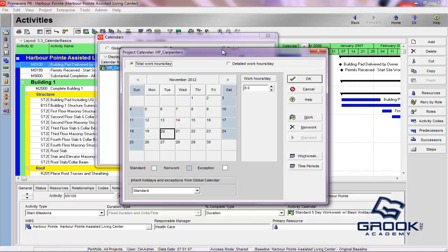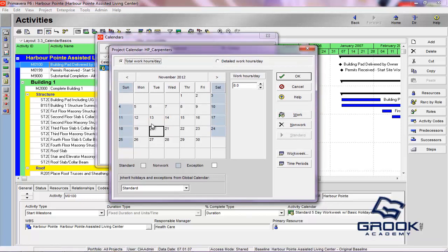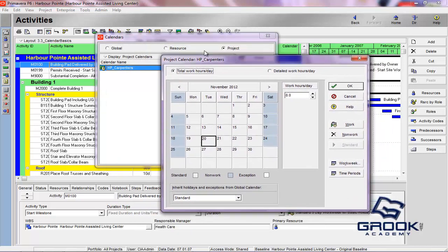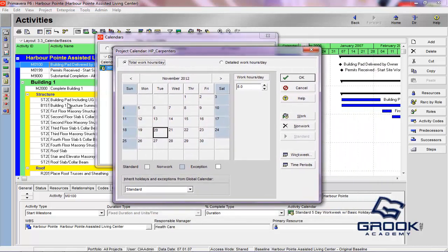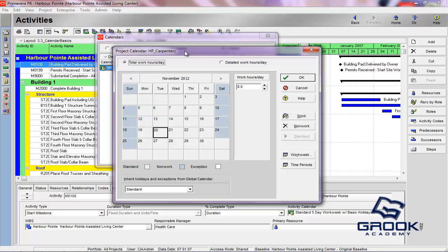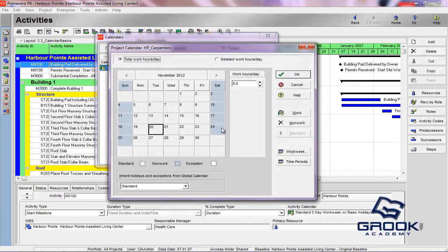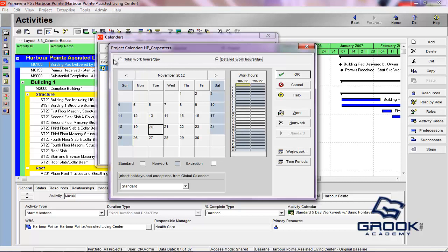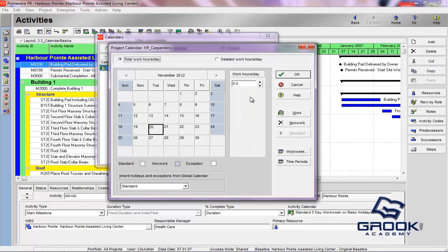Now this is where you're going to do the real work. You're going to determine when the actual availability of these Carpenters is. Now at an activity level, you might say that you have an activity over here that might be Woodwork. And you know in your mind that that's specifically related to Carpenters. So you may apply the HP Carpenters calendar to that activity. This calendar may also be applied just to a resource. So it could be a resource calendar and applied directly to a specific resource, which would be one of the Carpenters. But here you'll see you have total work hours per day and then detailed work hours per day. So basically all this does is show you this detailed little graph on the side or it shows you how many work hours per day they're available.